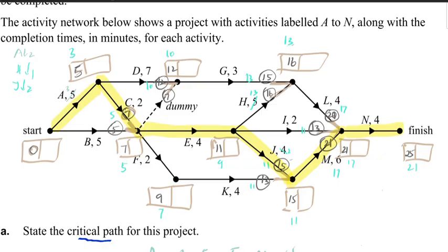Let's look at the activities that can be crashed so that we can get maximum reduction. So I looked at a few places which would actually give me a hint. I first laid out the critical path, and then if you look here, at this difference where the choices had to be made, it was a difference of 2.